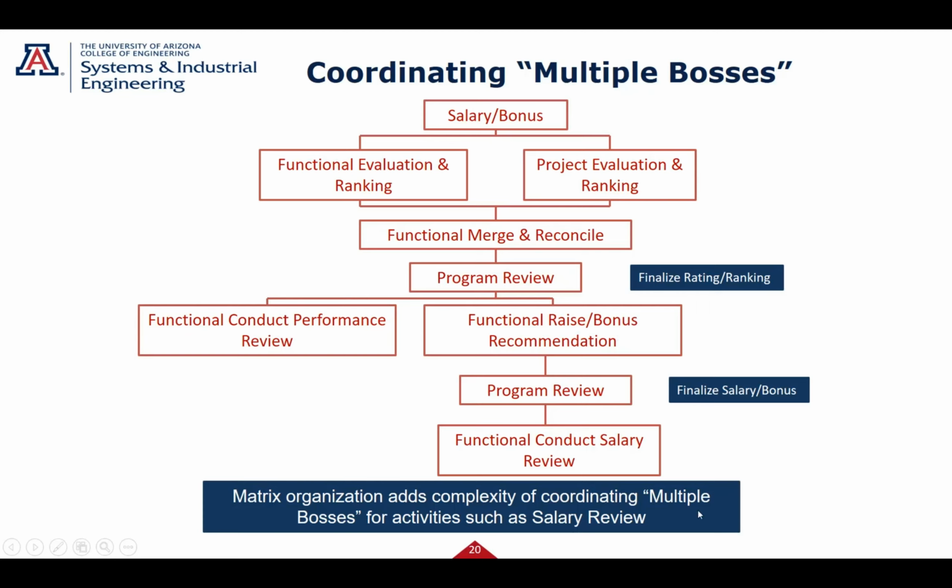So it does add some complexity on this review process of marching that through. But it can work, and it can be very good benefit. So generally speaking, the larger organizations are going to be matrix-based. Smaller startups and things, you're probably going to be project-based.